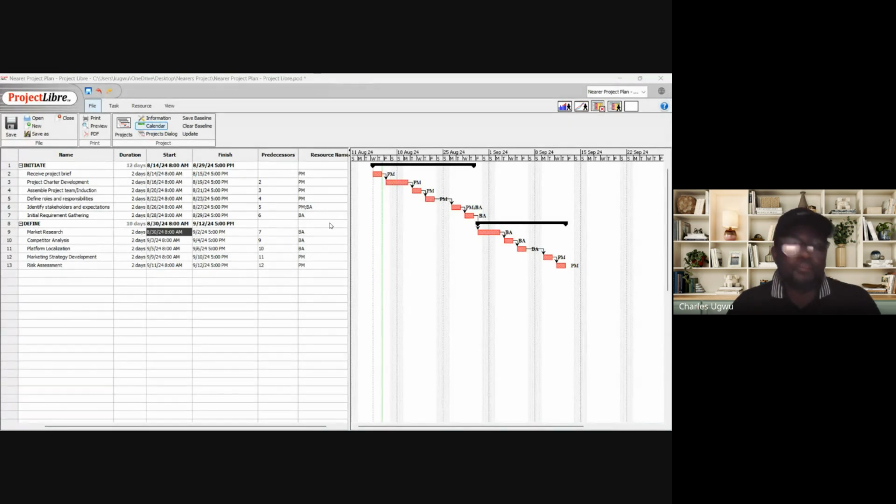If it's 2 days, maybe 13 and 14, you highlight 13 and 14. For you to do that, I hold on the Control button and I can highlight as many as I want. So that's what I'm doing. I highlighted 3, let's say these 3 days are bank holidays. And if you go to the selected area, you have to click non-working days, and you click on that, it's going to appear in ash and in red.